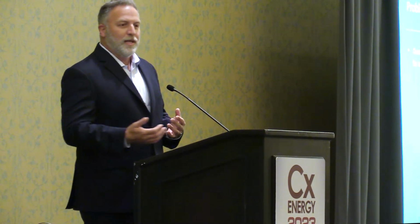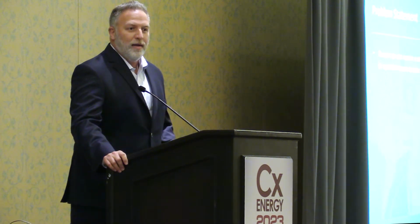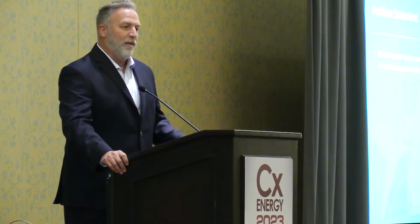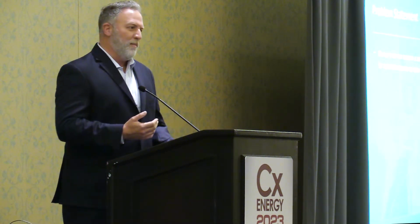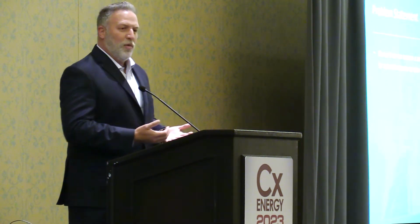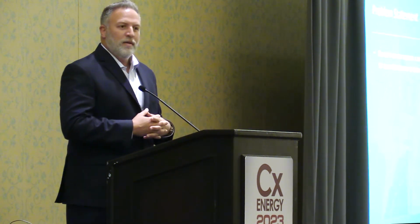We need to be able to take the data points and put them into our CMMS program and generate work tickets and track assets, so that our maintenance staff knows when the filters were last changed, knows when the devices were last calibrated, and has the quality control test reports to support that effort so they can plan their next activities. That's what I've been noticing over the past 6 to 8 years. As a CXA, I did my due diligence to ensure a seamless transfer of knowledge to the ownership team. I've seen a degradation in that high level of quality, even though the technology has increased and improved and everyone says they're focusing on transfer of operations.